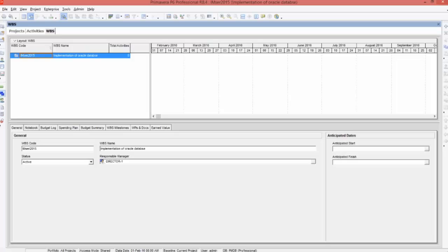Manageable, small and manageable units, exactly. So that is WBS. This project you can divide into some levels. According to some references which I got from the internet, you can create up to 7 levels of WBS or deliverables. If the levels of WBS become more than 7, it becomes difficult to manage.